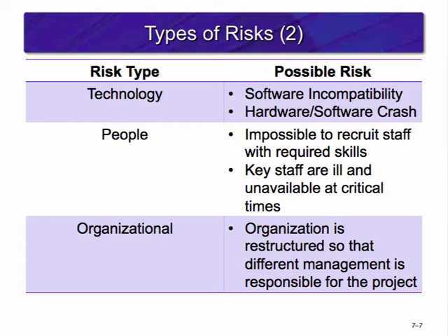The organization itself could be a risk. If the organization is restructured, you might find a new manager is responsible for your project. This manager may not have the same priorities or buy-in to the project. This could kill the project as well.